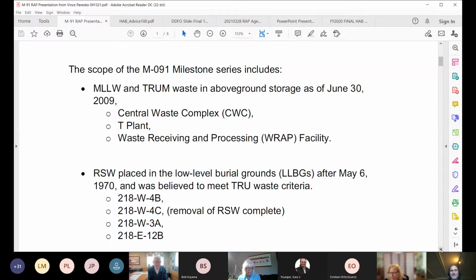I don't have time. One of the pushbacks DOE made over the last couple of years is, hey guys, we can't be forced to meet a milestone when we're dependent on other people off-site. If the RAPS facility, the WHIP facility, Carlsbad, is shut down, the Department of Energy at Hanford has no control over that. Holding them responsible for WHIP's performance was, in DOE's viewpoint, unacceptable. So there's been a discussion on that.